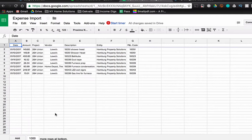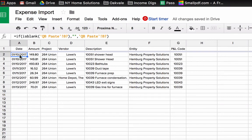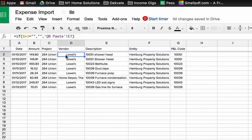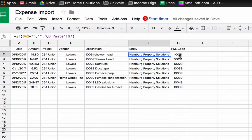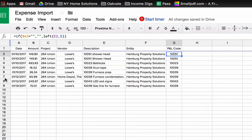I do a really easy calculation on another tab, which goes and grabs that five digit code. So if I bring it over to QB read, here's all my dates. You can see there's a pretty simple formula. It just goes to look at that other sheet and pulls in the date, the amount, the project, the vendor, the description, all of this is word for word. And then this PNL code is simply go grab the left five letters from E. It's really simple.